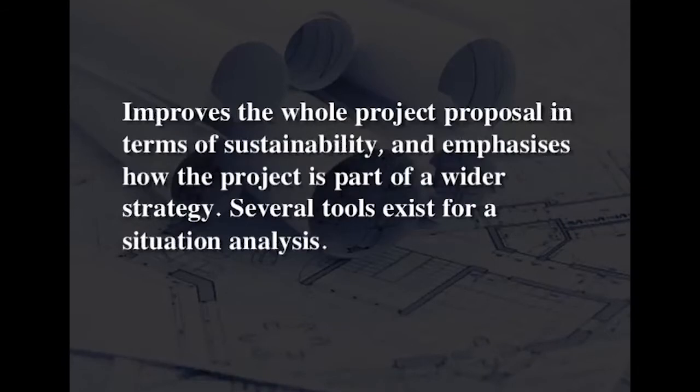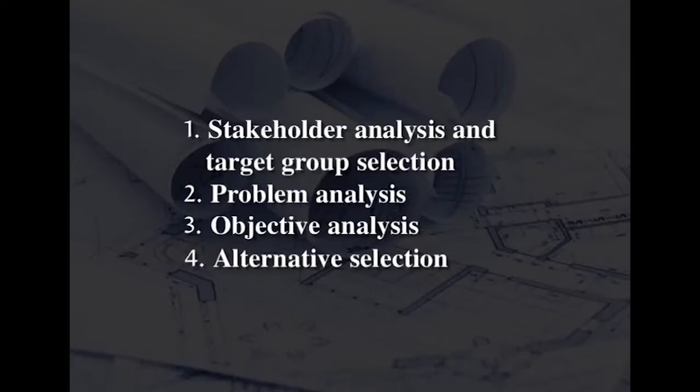It improves the whole project proposal in terms of sustainability and emphasizes how the project is a part of the wider strategy. Several tools exist for a situation analysis. To prepare a results-based project, four things have to be done. They are stakeholder analysis and target group selection, problem analysis, objective analysis and alternative selection.